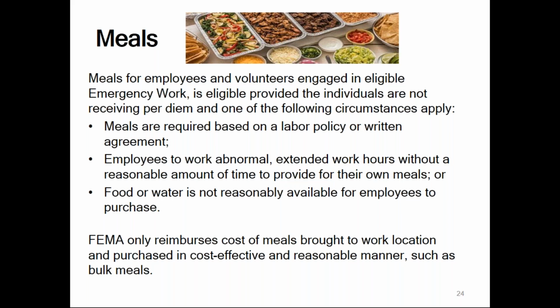Keep this in mind, FEMA only reimburses the cost of meals brought to the work location and purchased in a cost-effective and reasonable manner, such as bulk meals. If employees are going out to restaurants, taking breaks for their lunch, those meals will not be reimbursable under this program.